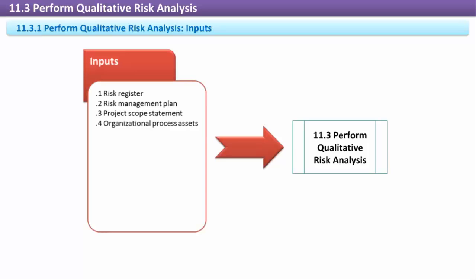Project scope statement. The project scope statement details the measurable goals, objectives, deliverables, and requirements of the project, and what the acceptance criteria of deliverables will be. It also describes the work required to meet all objectives and deliverables of the project, and it also contains milestones, assumptions, risks, and costs.